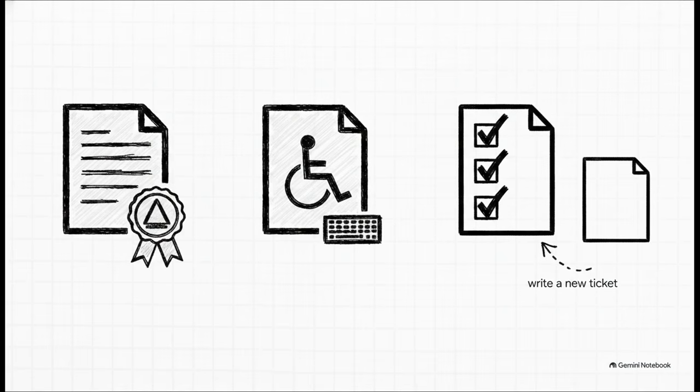And speaking of that definition of done, there are a few strict rules here that tend to surprise new joiners. First, audit events are strictly required if your change alters regulated state, like grades or permissions. Second, accessibility standards are mandatory on every single ticket, not just design tickets. Keyboard paths, contrast ratios, and labels have to be there. And lastly, no exceptions. You cannot selectively ignore the definition of done. If an item genuinely has to be deferred, you don't just leave a box optimistically unticked. You have to write a brand new follow-up ticket.